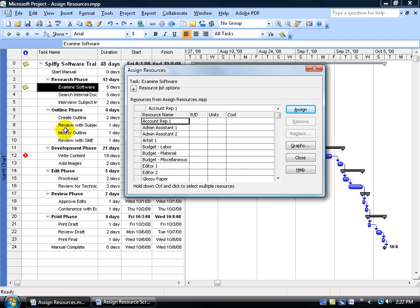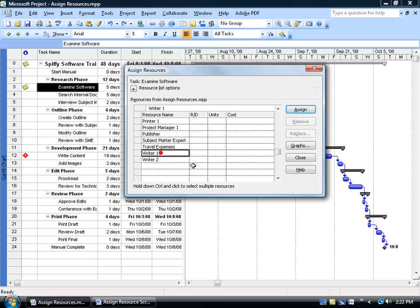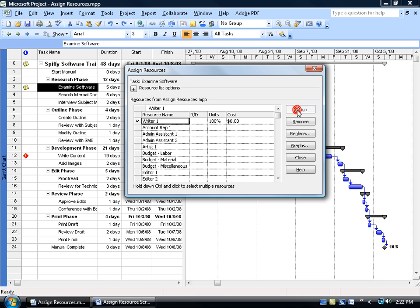In other words, we can't go back to the Resource Sheet view because we would lose our view here, so it brings it over here in a little pop-up window. Go ahead and scroll down and find your resource, Writer 1, click Assign, and that's it. You can see it's got a little check mark next to it. It's got that unit working at 100% or 8 hours a day. We haven't assigned cost to it yet.